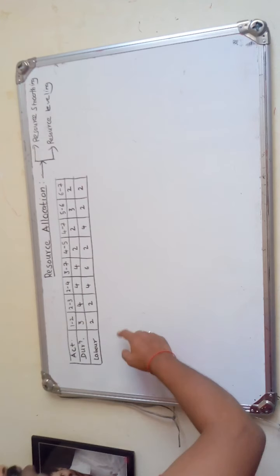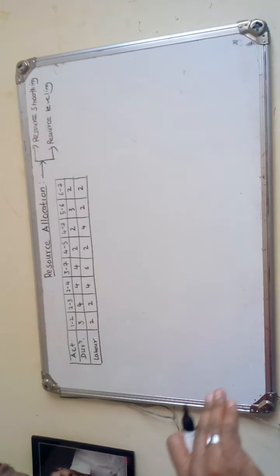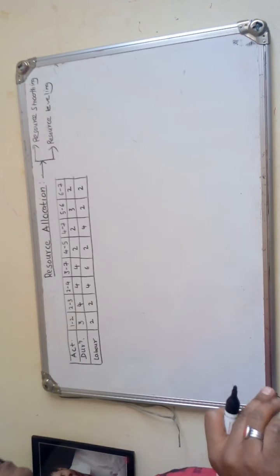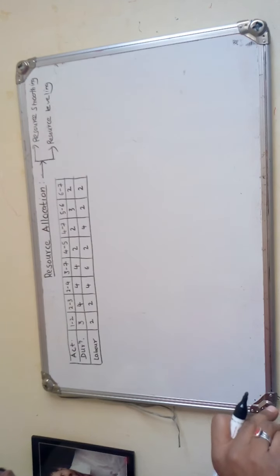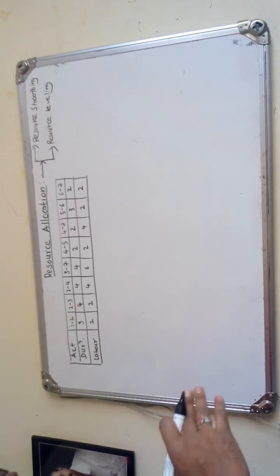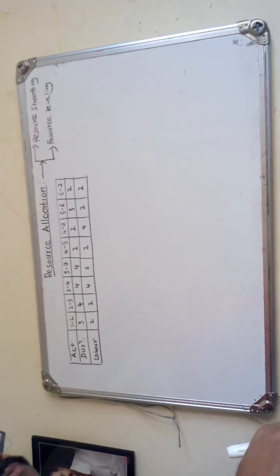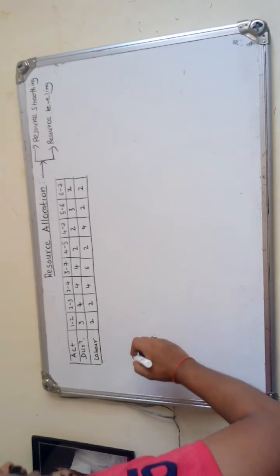Let us see the first step. The first step is that you have to draw the network diagram, then mark the critical path, and after that draw the time scale version diagram to find out the actual manpower requirement per day before the smoothing technique. Before smoothing and after smoothing, we will find out the effective force ratio. Now let us draw the network diagram first.